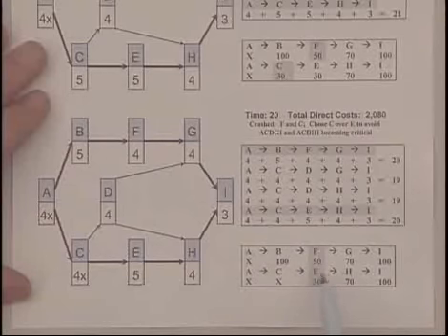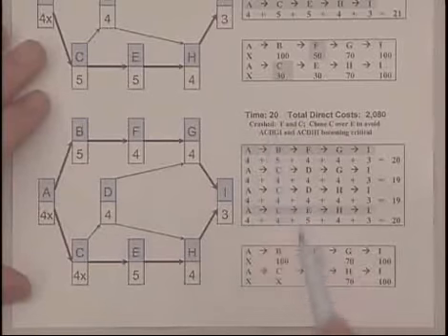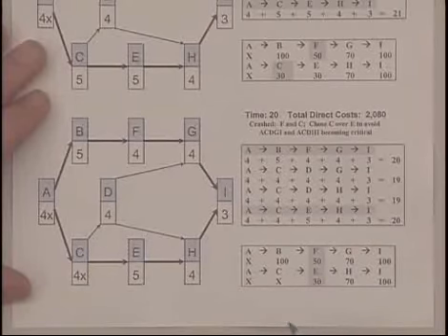We look at the options, and again we could do I, but F and E is still cheaper than I, 50 for F, 30 for E, so to go from 20 to 19, it can only cost us 80 if we choose those two activities, and that's what we'll do next.